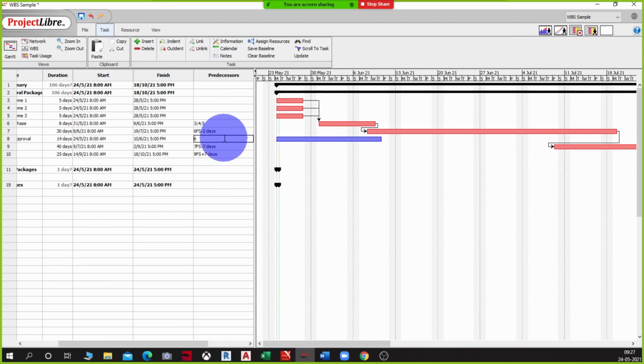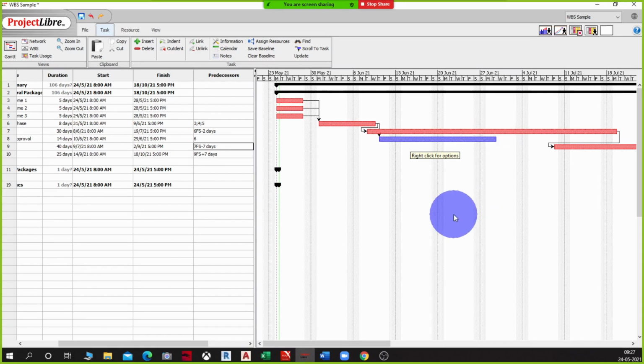You see, this activity is now not affecting the project in any way, right? There are other longer task items which are critical in nature. So I have enough lag and float available for this activity, so that's the reason why it is not in the critical path now. Generally in the critical path method, we have a float of zero. This is basically the rule: critical activities have zero float.